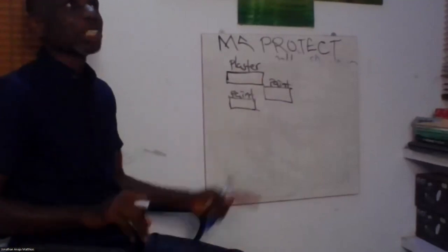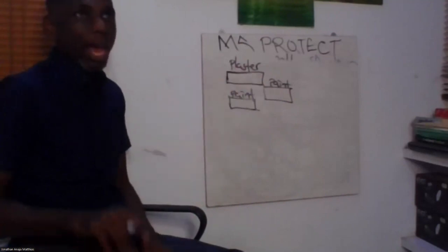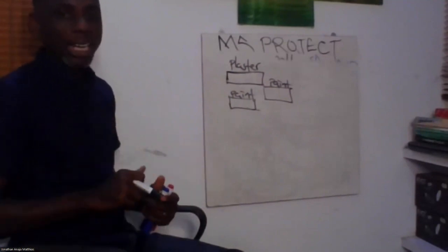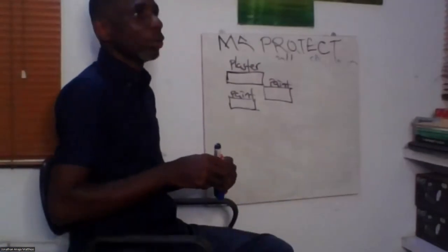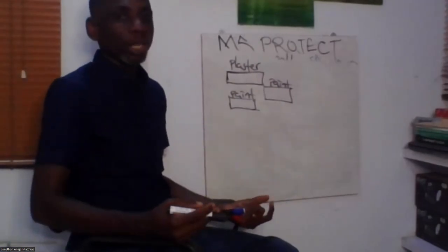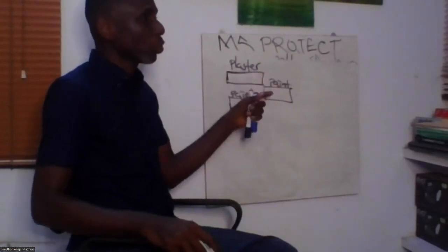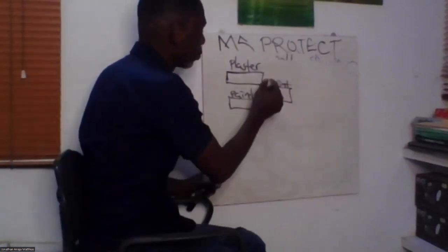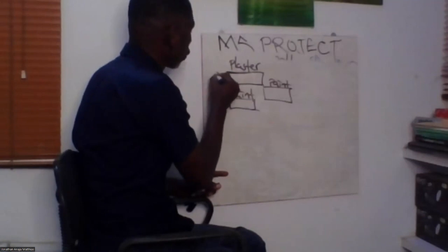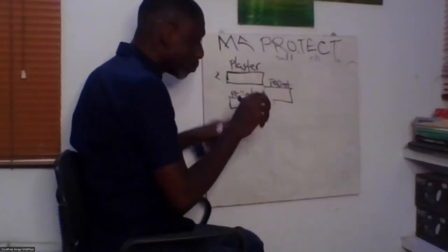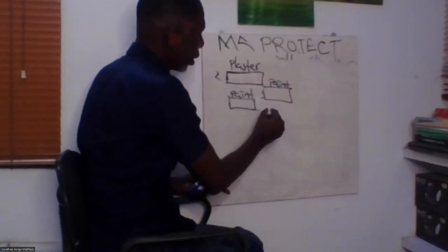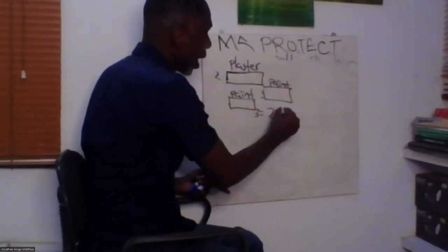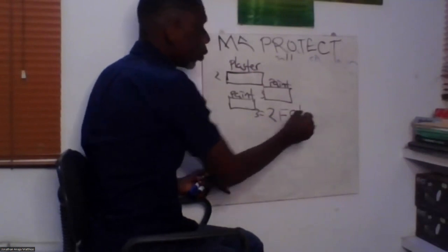But if they are finishing this work on a Tuesday and painting is coming after plastering, you will need to add a lag, because you know that they can appear the following morning to start painting this wall, and the plastering that they did the day before, maybe the masons worked late till about 6 p.m. So when you are scheduling this project, if this is 2 and this is 3, you can input in your software, you can say 2, that's your 3 now, paint will be equal to 2 MS plus your expert judgment.